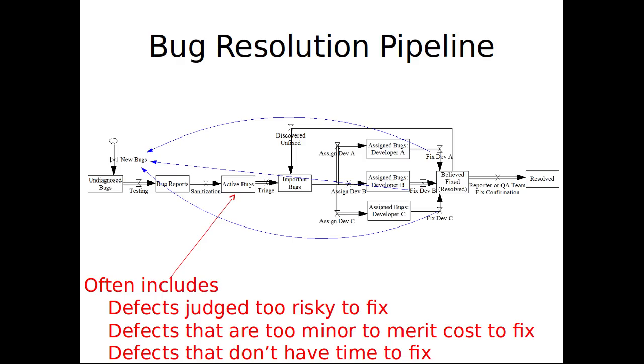Serious issue. So for active bugs, the process of deciding which of them we fix is called triage, okay? And this triage team role is one that project managers, often dev leads, and often test leads are involved in, working through this triage process. You're basically figuring out, okay, what are the most serious things here?